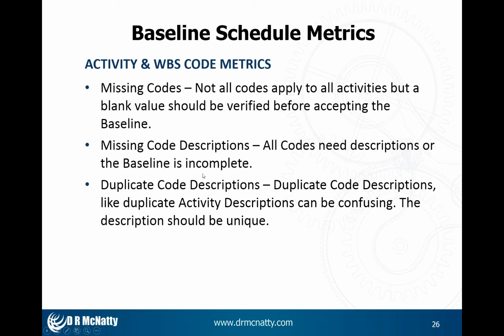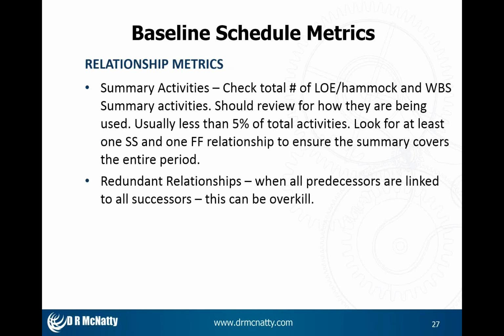Okay, code descriptions. Just like activity descriptions, whether it's an activity code or WBS code, you need to have a good description that tells us important information about what this code or what this WBS is about. In the same duplicate formwork example, I usually look at adding the location to the description so that I've got uniqueness. So I like to see unique descriptions that communicate better, especially when we're doing summary presentations of a schedule.